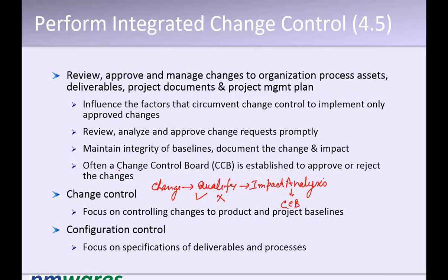What is the Change Control Board? The Change Control Board is a committee which you form. It can contain anyone as such. It can contain the project manager and team. It can contain the project manager and customer. It can contain some people from the project team, some people from the customer team. It can contain a sponsor. It can contain the senior management.